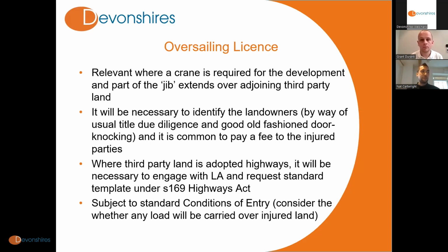It is apparent from the crane layout, which is often prepared by the architects in their drawings at the early stages, that they can get a good idea of what sort of third-party land encroachment there's going to be. And so if there is going to be any third-party land encroachment, then that's when an oversailing licence will be required.